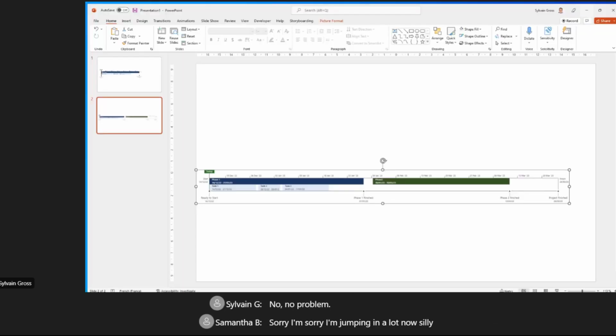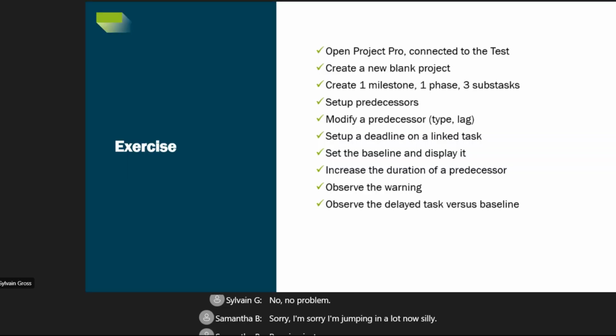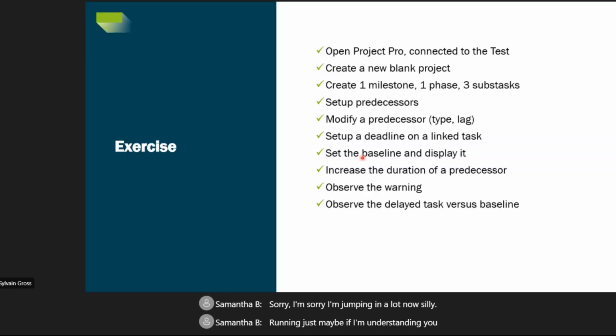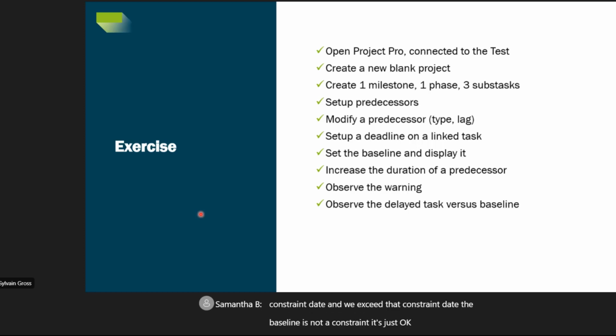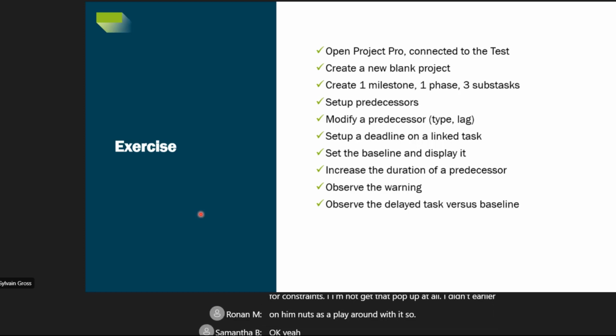I'm jumping in a lot now, Sylvain. Ronan, maybe if I'm understanding your question, coming back to the original exercise on constraints, there's a mix-up there if I'm hearing you right. That pop-up only appears when we have set a constraint date and we exceed that constraint date. The baseline is not a constraint. Okay, I understood. It's just I'm not getting that pop-up for constraints. I'm not getting that pop-up at all. I didn't earlier and I'm not as I play around with it. So okay, yeah, we'll look at that.